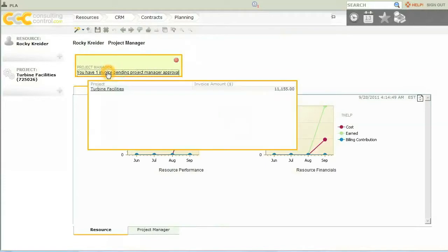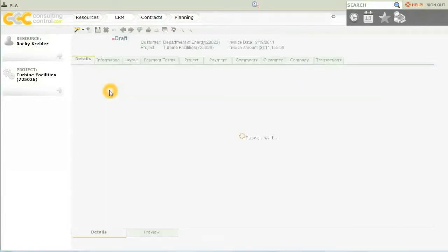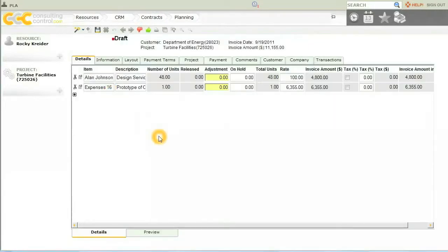We'll do the same thing for the invoice. We'll click on the invoice, and here we are. All billables on this project are listed here in the draft. In this project, I know that we have spent too many hours. So for example, we have 48. We want to reduce here. We're going to reduce by 8, like so.